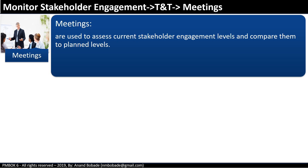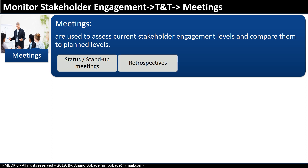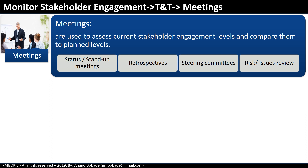Meetings are used to assess the current stakeholder engagement level and compare it to the planned level. Examples include status meetings, stand-up meetings, retrospective meetings in an agile environment, steering committees, and risk and issue-related meetings. Data analysis and data representation techniques can be applied in these meetings to come up with options to align stakeholder expectations.